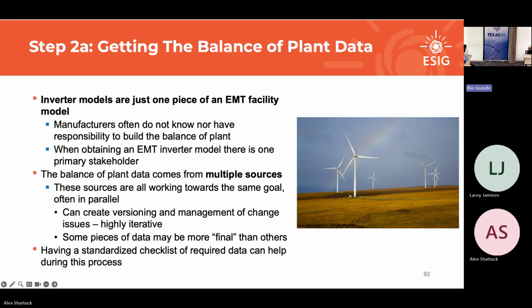But the big thing to keep in mind goes a little bit against what I said earlier. If you're asking for data, having a standardized checklist helps. I used to have a standard checklist, but broken into categories for different types of studies. It's really easy to just forget to ask someone for something during a data collection.